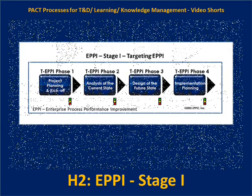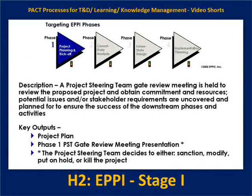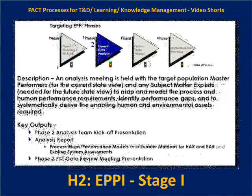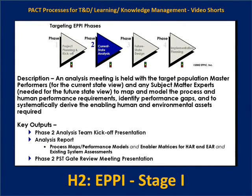In Phase One of targeting EPI, we're doing project planning and kickoff. We're meeting with a project steering team to review a draft of the project plan and getting their commitments — whether to kill the project, put it on hold because it's not timely, modify the approach, or to buy in and sanction it.